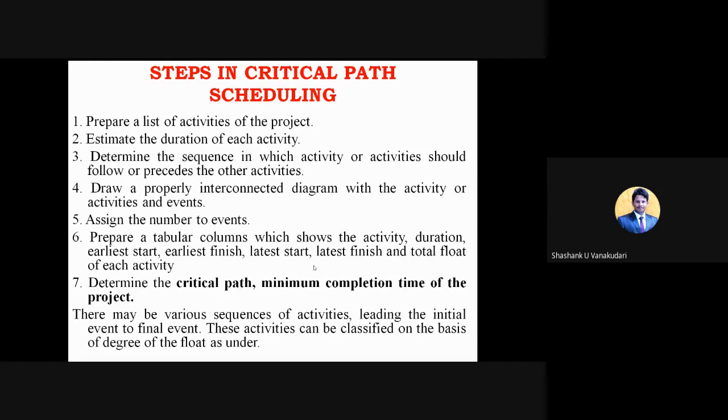And we'll be telling about this particular path, which has much importance for your subject. So we'll study in depth about these different time estimates. And then after providing this, we need to find out the critical path. That is, this is actually the maximum completion time of the project, and there may be various sequences of activities leading from the initial event to the final event. This is maximum, just to make a correction.